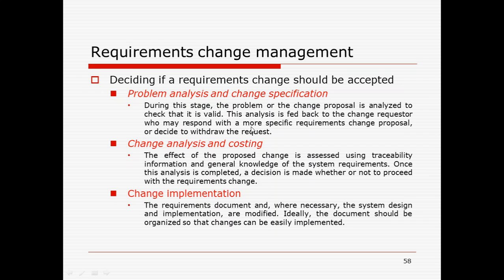So it is sent to the change requester to identify whether they accept the result of the analysis, or come up with a very specific requirement change proposal, or wish to withdraw the change. The person's opinion is taken before implementation, and then it goes for the specific inclusion in the software.